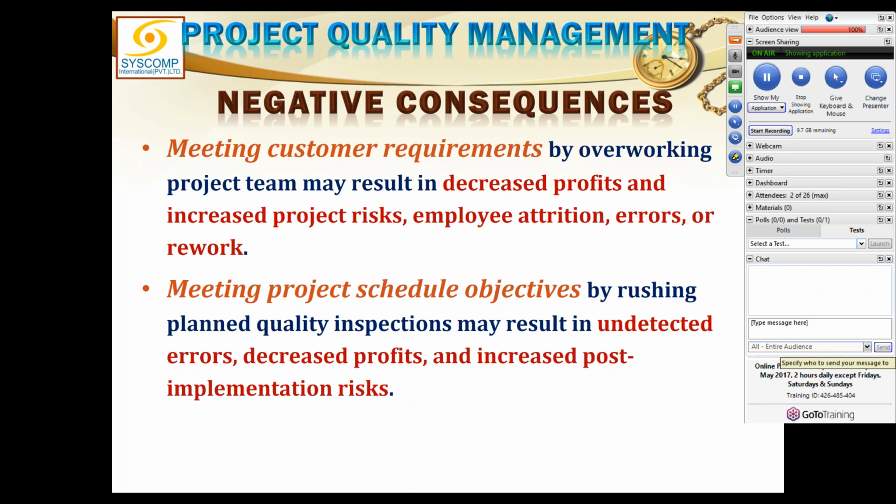You are rushing everything. So what we did was we increased the workforce, we increased the working hours, we started working 3 shifts of 8 hours daily, and extra equipment was acquired, and many stations all over the country were started. More than 15,000 people were working at any one time on this job all over the country, and they were working in 3 shifts. And that's how we managed to do it in 6 months.